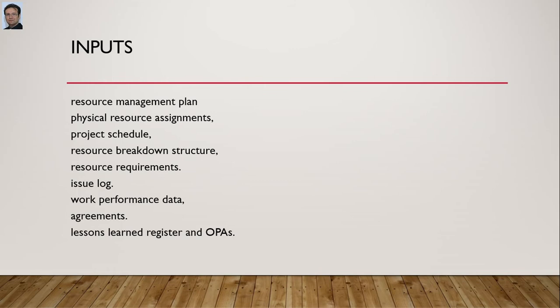Agreements made within the context of the project are the basis for all resources external to the organization and should define procedures when new unplanned resources are needed and when issues arise with the current resources. Because you always remember, all resources will not be available for your project, so you will outsource many activities. So agreements and understanding of the agreement as a project manager is very important to control resources.